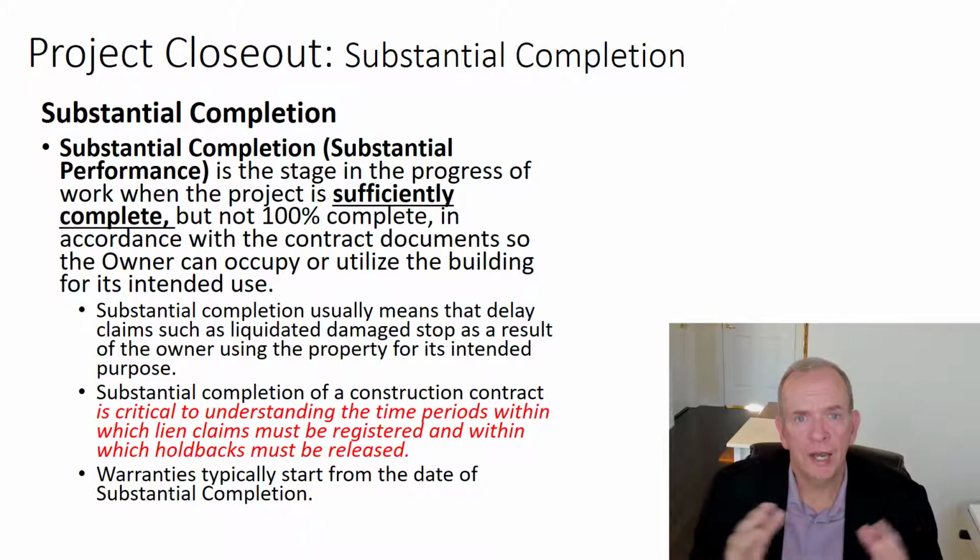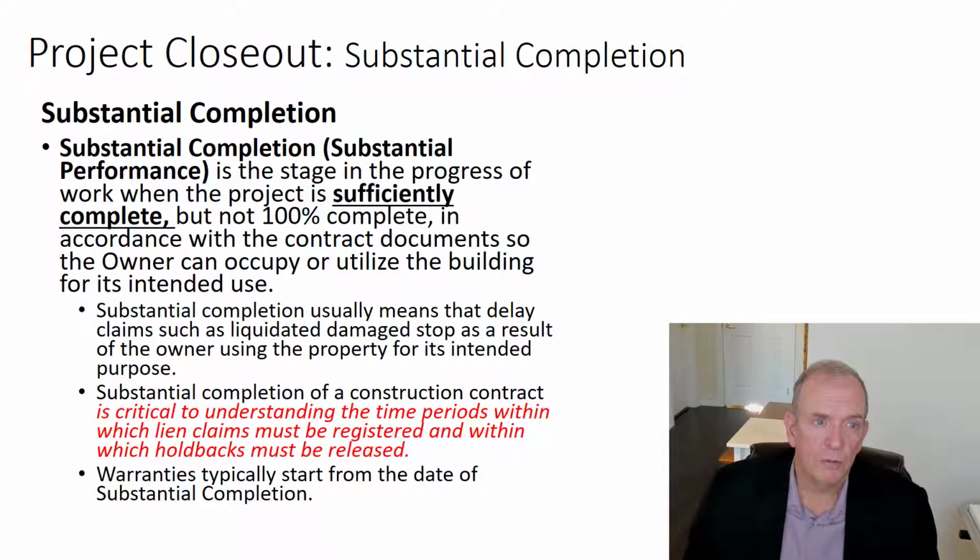Substantial completion kind of goes with occupancy. You're not going to get substantial completion if you don't have occupancy. Substantial completion means the building can be used for its intended purposes. You could get occupancy without maybe having substantial completion. For example, the building is safe: the fire alarms, fire systems, elevator systems, railings, all of those elements are deemed to be safe. But maybe in the classrooms you don't have the projection units, and you need the projection units to run the class.